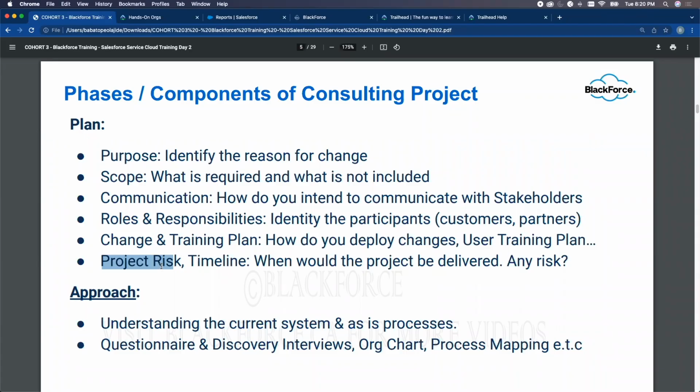What are the possible risks? Bad data, inconsistency in data, real-time data getting lost in the legacy system while you are importing data into Salesforce. So how do you ensure that the real-time data will be getting into Salesforce the same day you're doing the imports? Data freezing time.